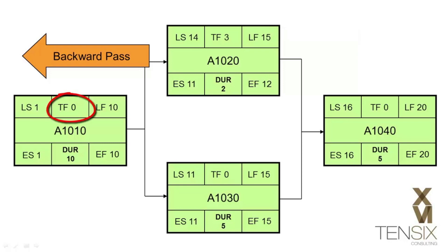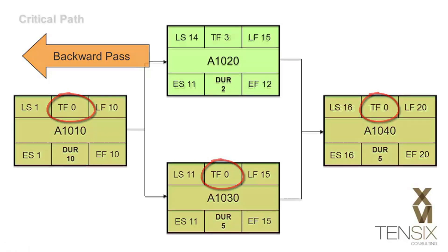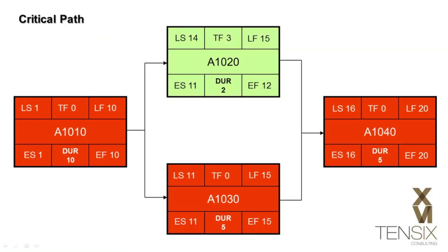Activities that do not have float cannot slip by even one day without affecting the project end date and are therefore considered critical. This type of calculation is known as critical path method, or CPM. It reveals the critical path through the network and alerts project managers to the activities that will need the most management if the project is to be completed on the planned finish date.